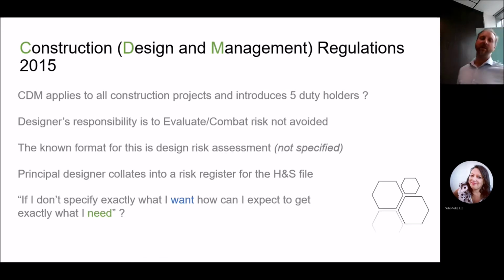So, Construction Design Management Regulations 2015, or CDM. CDM applies to all construction projects and introduces 5 duty holders. The duty holders being the client, who's responsible for the health and safety of the project, the principal designer, who is responsible to plan, manage and monitor the pre-construction stage, the principal contractor, who plans, manages and monitors the construction stage, contractors to plan, manage and monitor their own work, and designers.